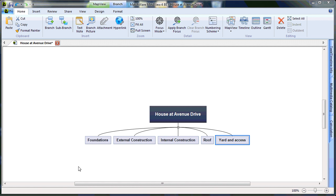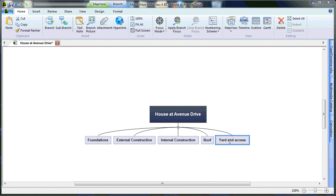To speed up this tutorial, I have simply created my additional three levels. As you can see, there are five main stages to my Work Breakdown Structure for House at Avenue Drive: Foundations, External Construction, Internal Construction, Roof, and Yard Access.